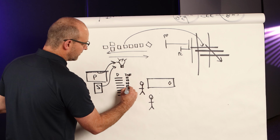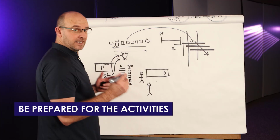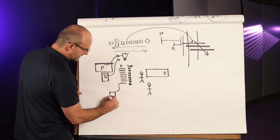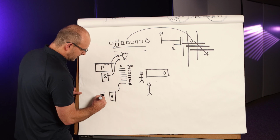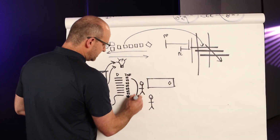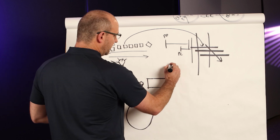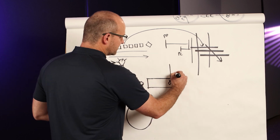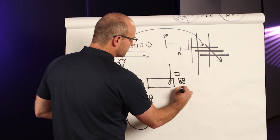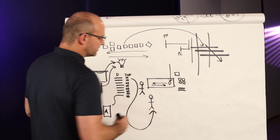Now this could be for the overall building, for the floor, or specifically for that zone, but please come prepared. Now if you want to really be prepared for each activity, if you say, hey, this is my activity, also list out what that activity would need to have done for it to be successfully completed. If you come into the meeting like that, you should expect the facilitator to talk about the conditions of satisfaction, the milestone, the sticky, assign you a sticky color, go through the rules of the overall pull plan, and then basically start to work backwards or work forwards to create the sequence.